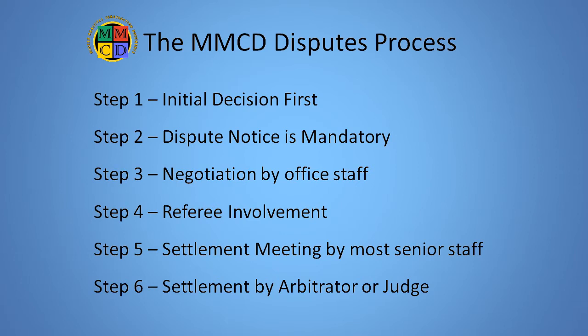Step 4. Failing that, an independent referee must be brought in to give an opinion unless both parties agree to waive the step or a referee cannot be found in time.